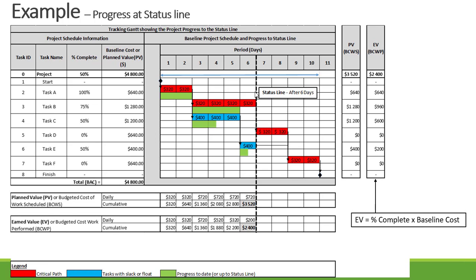Now let's look at our earned value — percentage complete times the baseline cost. Task A: 100% × $640 = $640. Task B: 75% × $1,280 = $960. Task C: 50% × $1,200 = $600. Task D hasn't started. Task E: 50% × $400 = $200. Cumulatively that adds up to $2,400 — our earned value up until the status date.